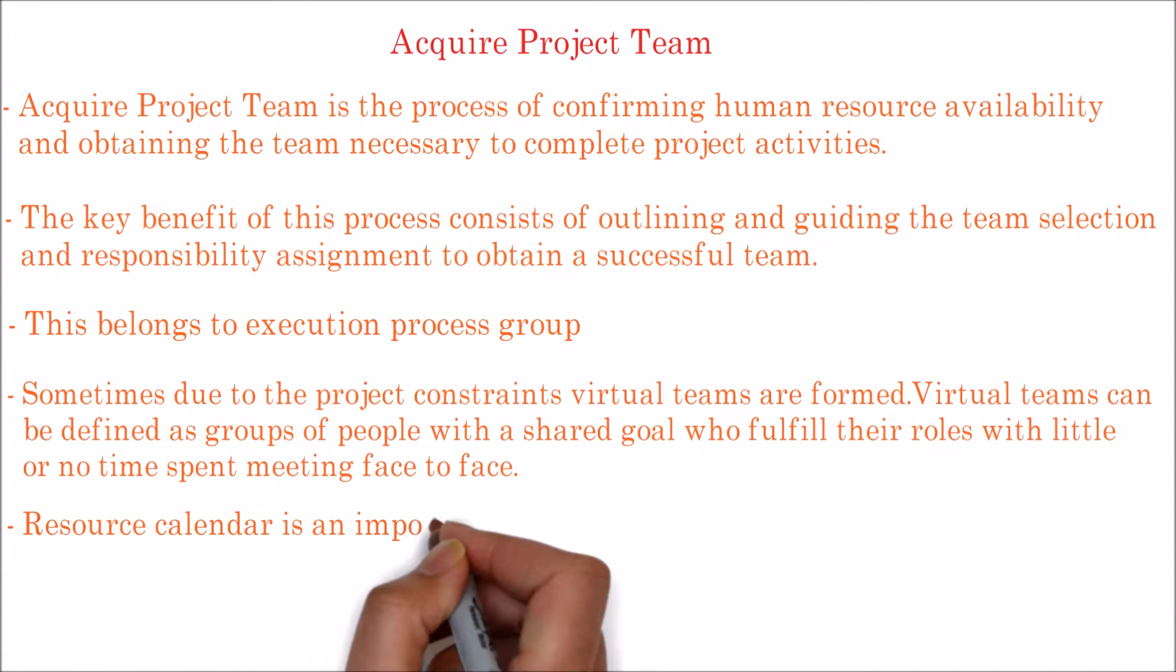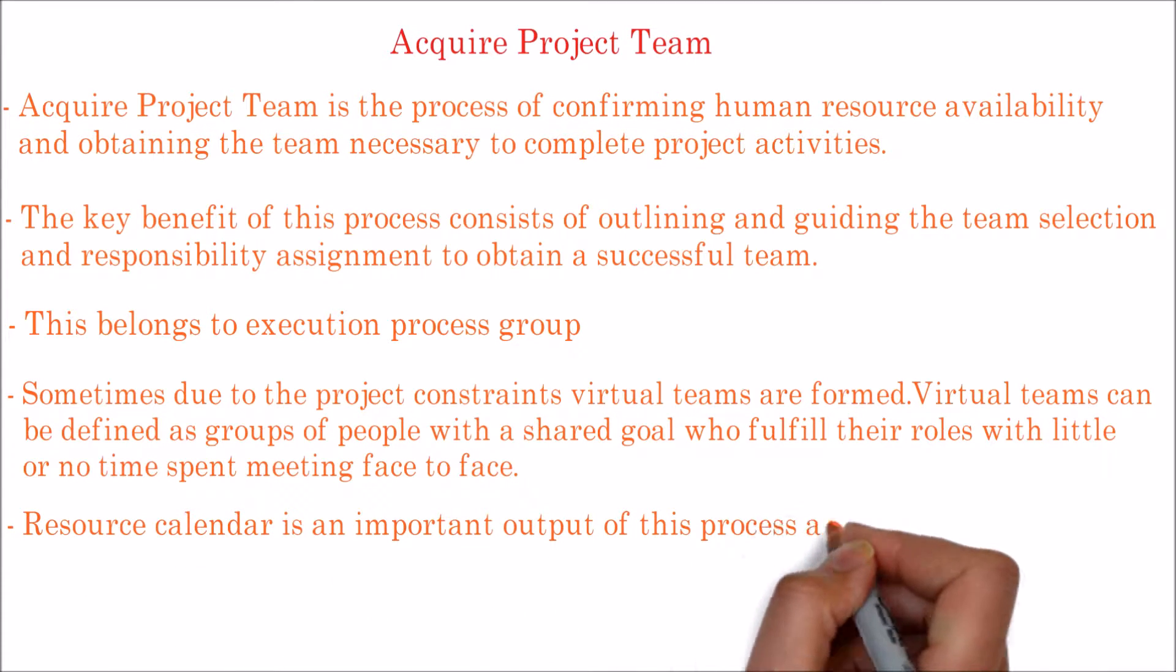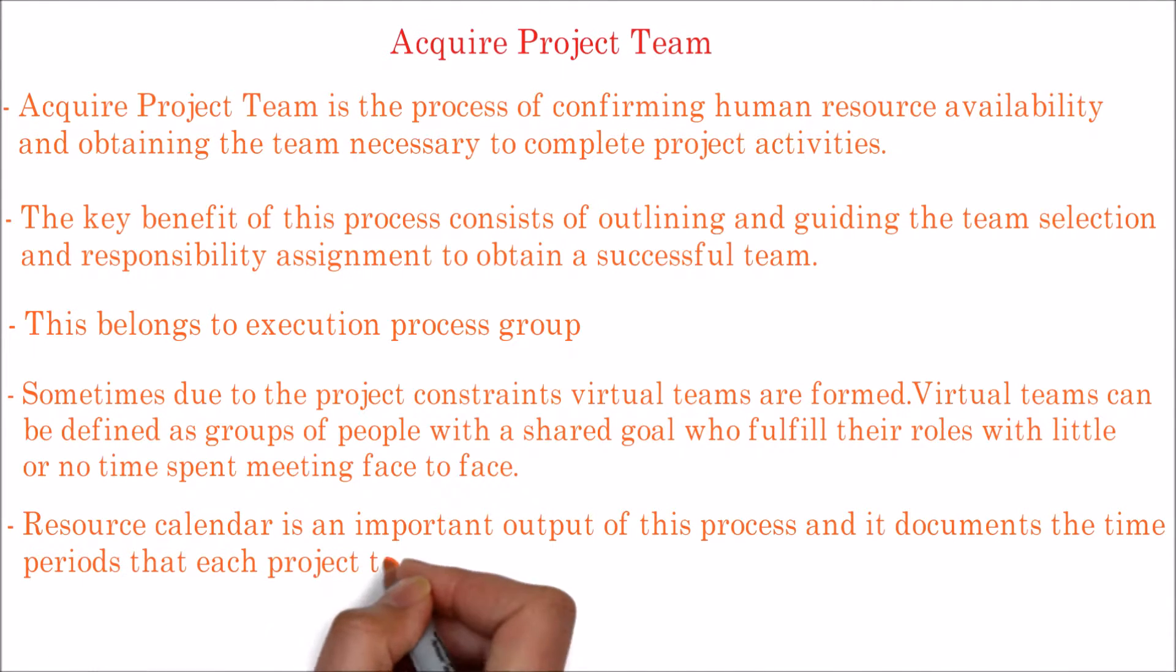Resource calendar is an important output of this process and it documents the time periods that each project team member is available to work on the project.